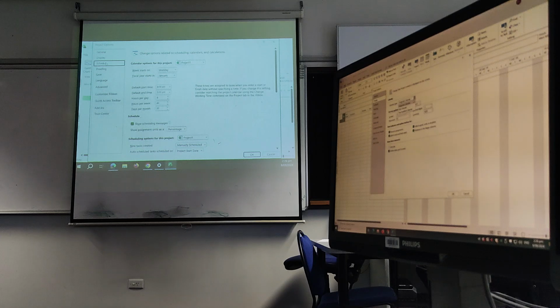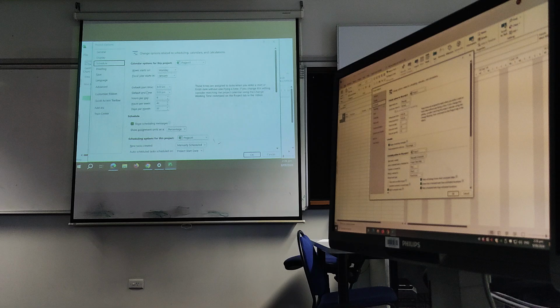So you're looking at the schedule. So you can alter the way it works, but Monday, January start. This doesn't really matter, because in civil engineering we are not working in hours, we work in days. That is the smallest time period we use, is days. Don't split it into half days or hours or anything like that. Hours is if you're doing computing or one of those things where it makes a difference. In civil engineering, we work in days, weeks, months. Okay?